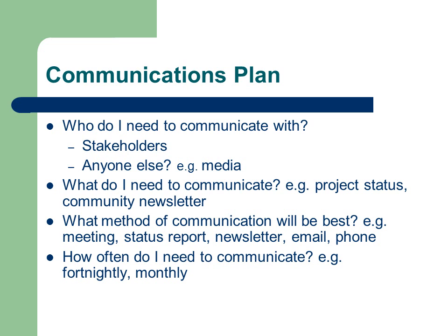A communications plan must be documented at the beginning of the project as part of the overall project management plan. This slide illustrates the key questions you should be asking when you are developing your communications plan. Who do I need to communicate with? The stakeholders? Anyone else, for example, the media? What do I need to communicate? For example, project status or a community newsletter.